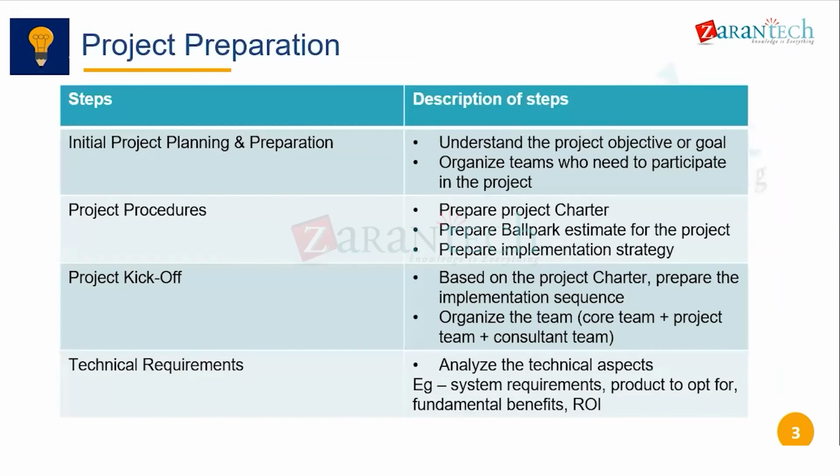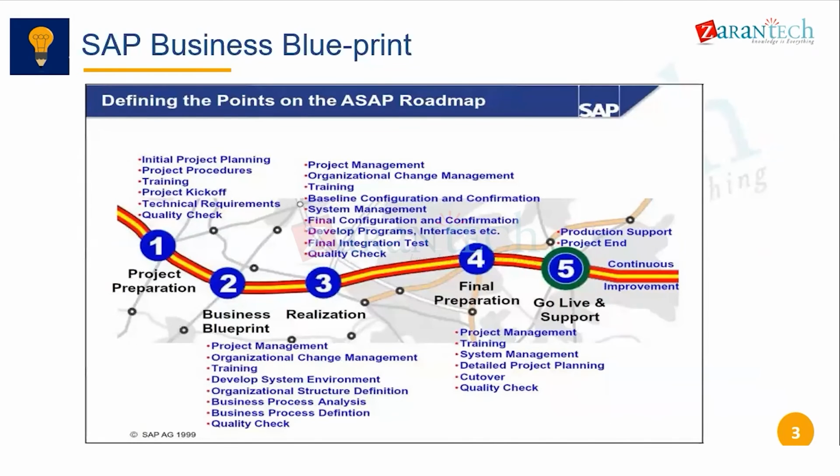Once you get to this go live step, sometimes we have a clause for it. After the go live, there can be some kind of hypercare. What does hypercare mean? Basically, the system is very new, so there can be some missing things that the business might notice, and you would need to fix them on an immediate basis. So we need to be on our toes in this hypercare period. Most of the times we have seen, it's 24/7 support during the hypercare period.